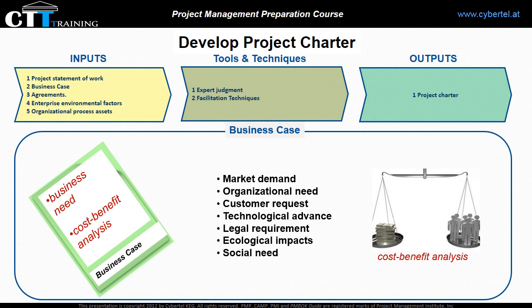In the case of multi-phase projects, the business case may be periodically reviewed to ensure that the project is on track. For the sponsoring organization, a periodic review of the business case helps to confirm that the project is still needed.